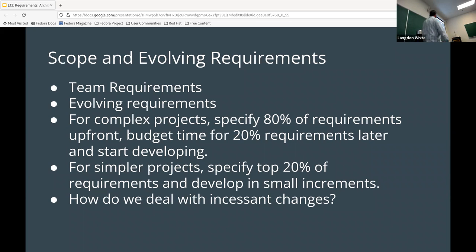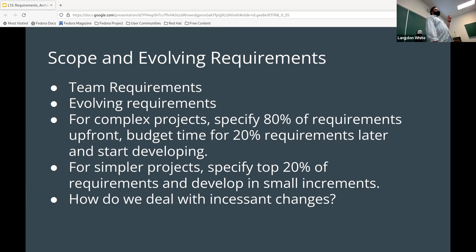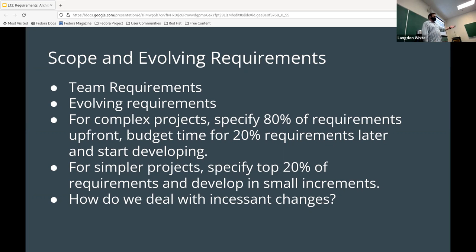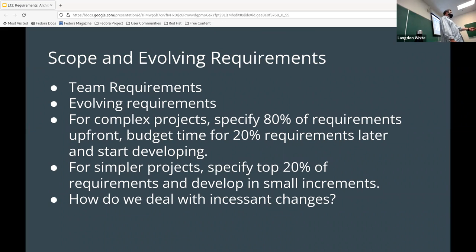Another big problem is evolving requirements, or scope creep. In agile methods, scope creep is actually a good thing in the sense that you want your requirements to evolve over time — but you need to recognize that that's what's happening. For example, you start with three user stories, which evolve into seven, and one of the first three gets killed as not being valuable. That doesn't mean nobody spent time on it — the work was done, but the result wasn't what users needed.